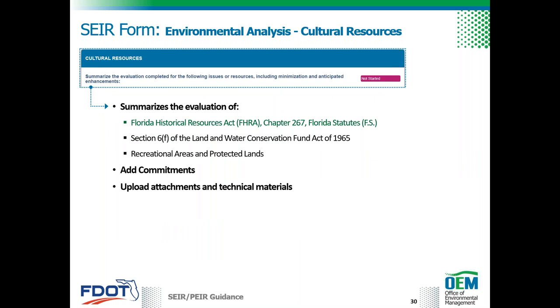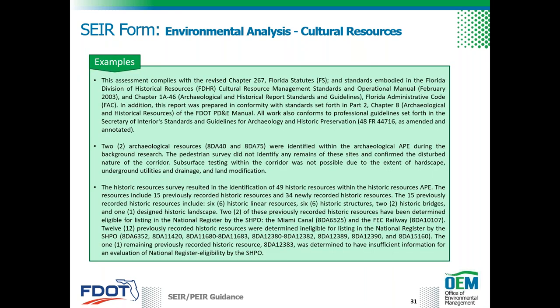The next section on cultural resources summarizes the evaluation of historic resources protected by the Florida Historical Resources Act, Section 6F of the Land and Water Conservation Fund Act, as well as recreational areas and protected land. Here you'd upload the cultural resource assessment survey report, the Section 106 programmatic agreement impact form, State Historic Preservation Office or SHPO concurrence letters, Section 6F documentation, and any coordination documents regarding recreational areas and protected lands such as state-owned upland conservation lands.